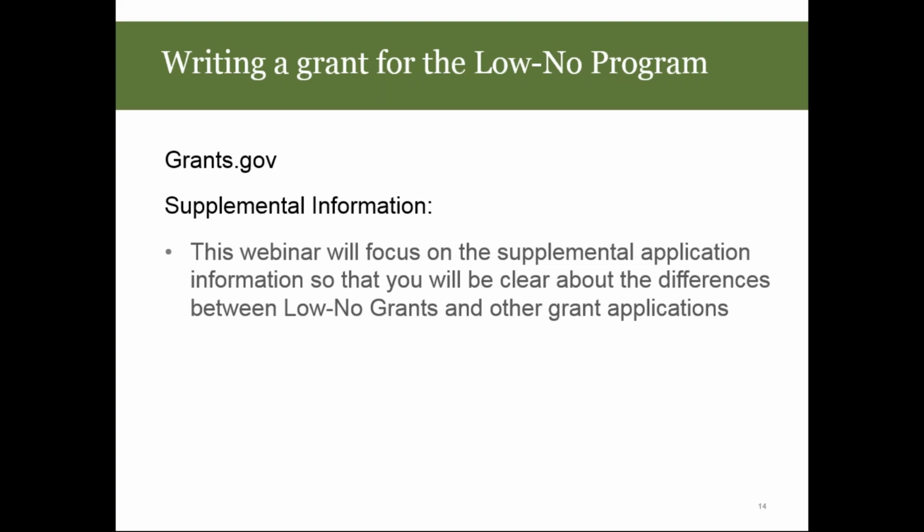That's great. Robin, so, Blake, go ahead. Robin, this is Keith. I just wanted to add, if you didn't mind. Oh, go ahead. That was how we determined on our first round. We since have been awarded again to get more electric buses, and we did the selection through an RFI, and we had the different bus manufacturers this time put a bus at our location to test before we opened the RFP. Just wanted to add that piece.